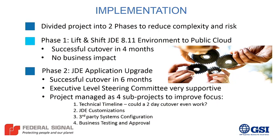We didn't want to do that. So with GSI's help, man, we brought the timeline down of the double upgrade, since we had to go from 8.11 to 9.1 to 9.2. We had to do 1.2 terabytes of data twice, and it was about 140 hours, I believe, down to 30 hours. So with a little bit of solid-state drive help and some manual manipulation, we got it to about 30 hours. So that was kind of nice. It was hero work. GSI did not ask me to say that, but that was hero work. We said, please take this problem and fix it. Help us. And there was some real creative juice over there.